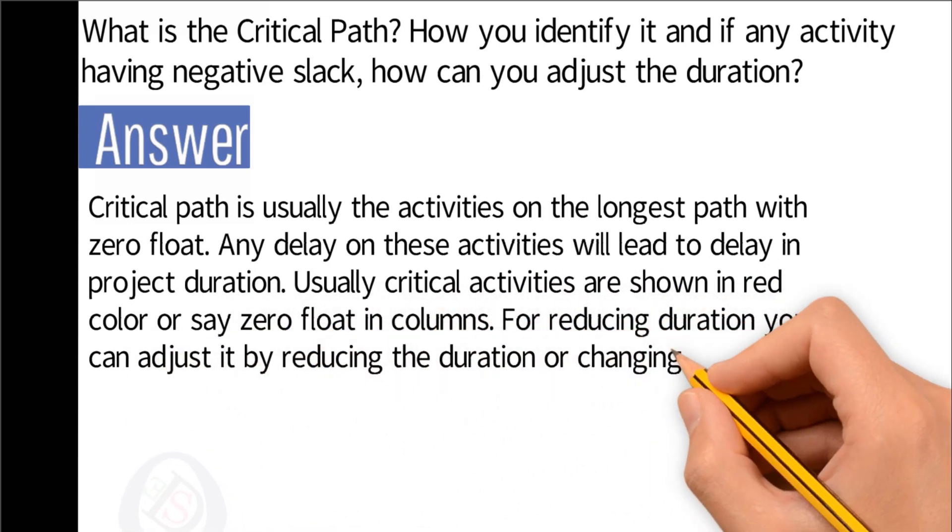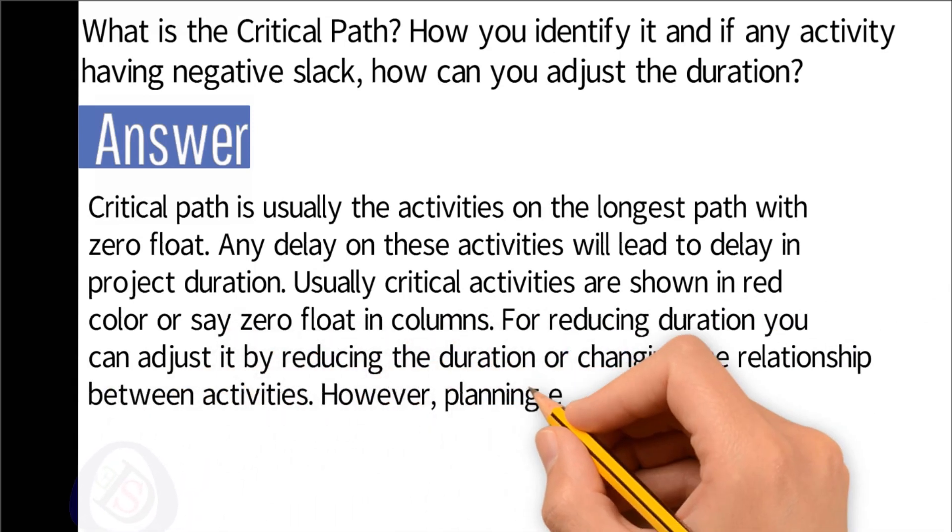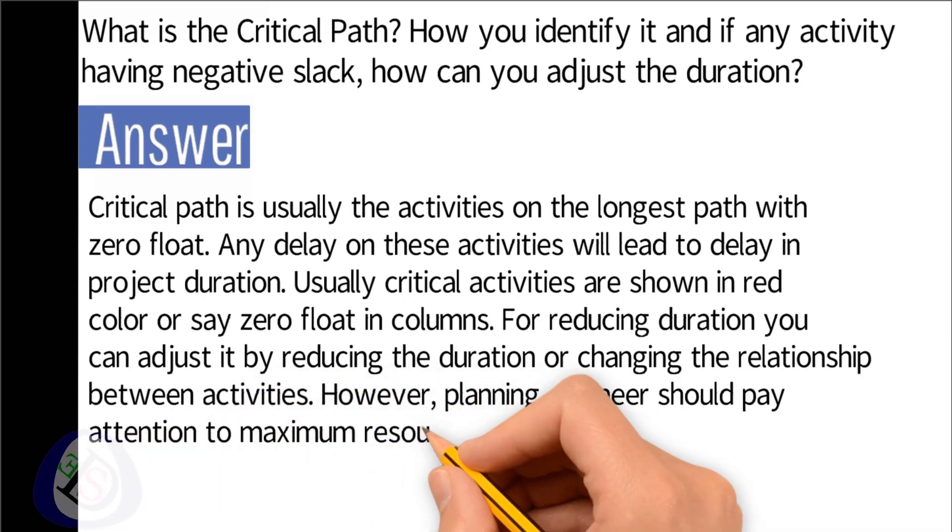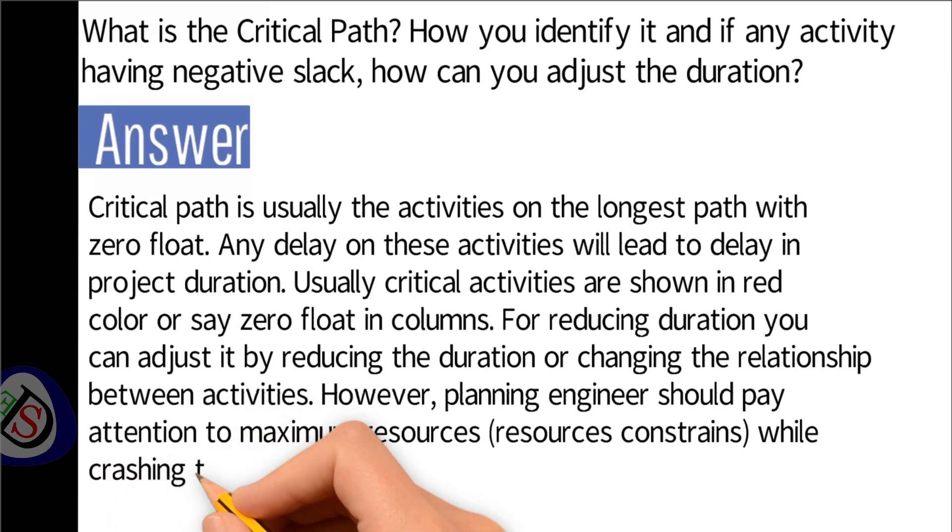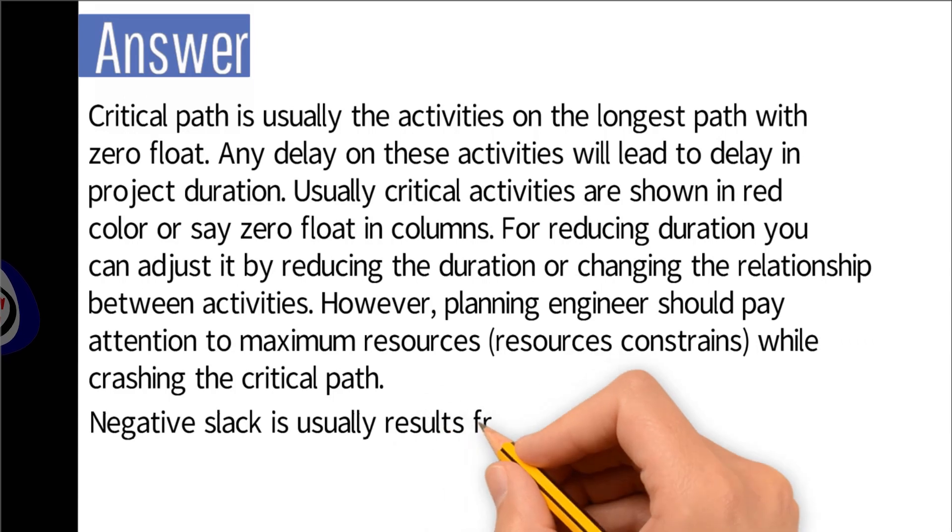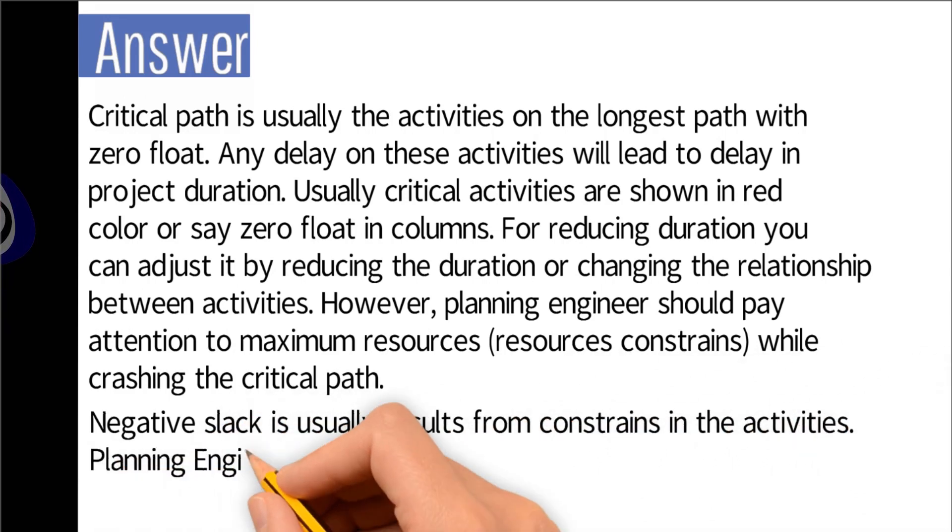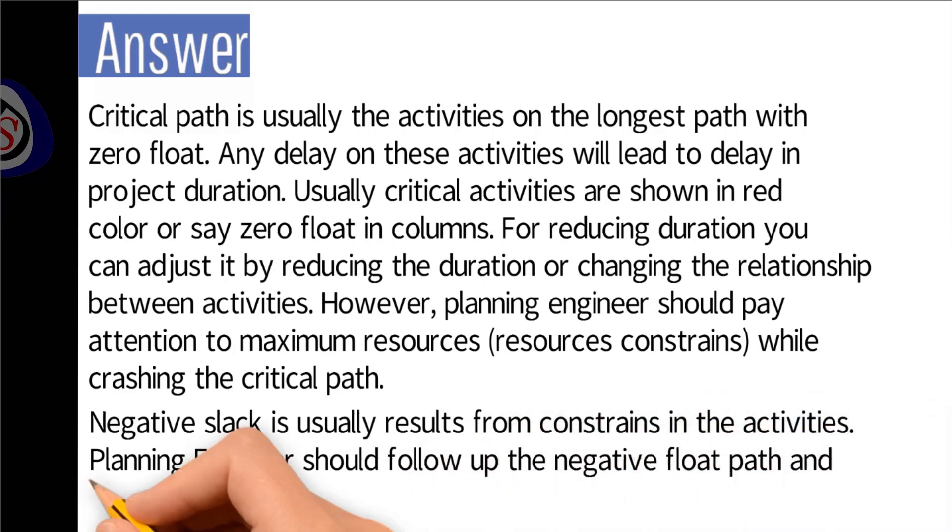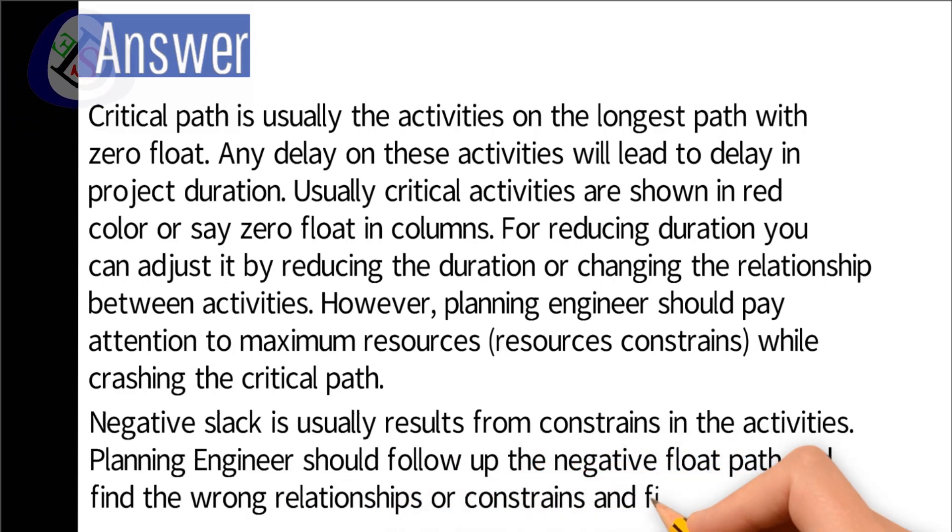For reducing duration, you can adjust it by reducing the duration or changing the relationship between activities. However, planning engineer should pay attention to maximum resources constraints while crashing the critical path. Negative slack is usually results from constraints in the activities. Planning engineer should follow up the negative float path and find the wrong relationship or constraints and fix it.